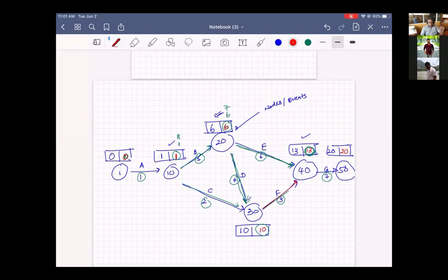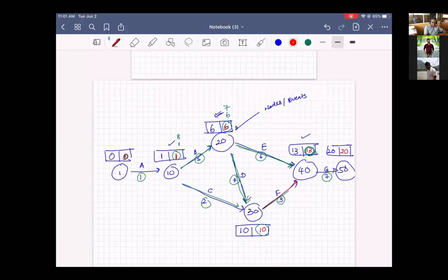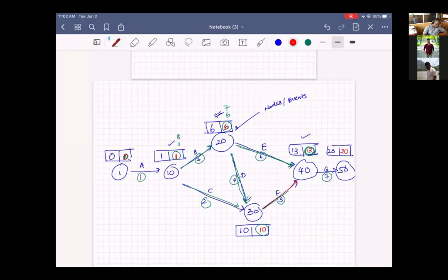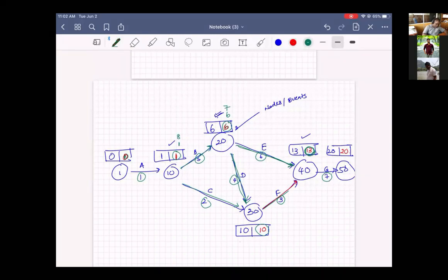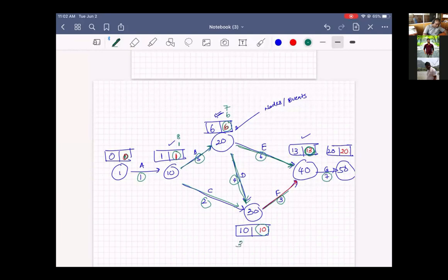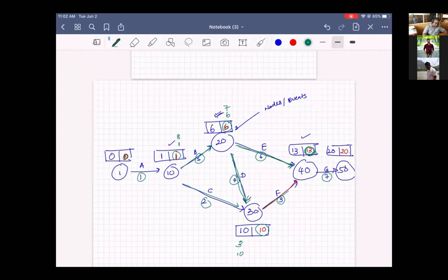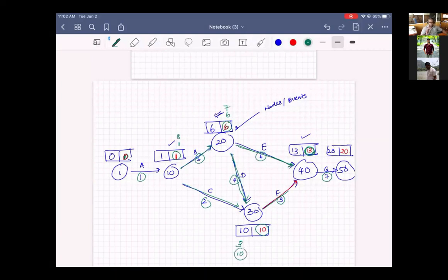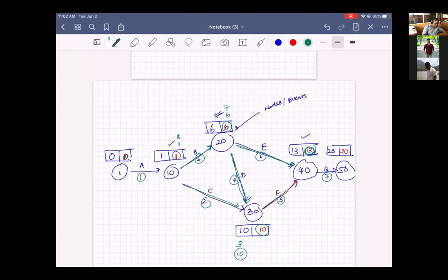Okay, I will explain. The next example is anyway a construction-related one. I'm doing the theoretical stuff here. Why take the higher value going forward pass? Let's say in the forward pass, this was a place where we had two values. 1 plus 2 is 3, 6 plus 4 is 10. So we take the higher value. Right? Why?